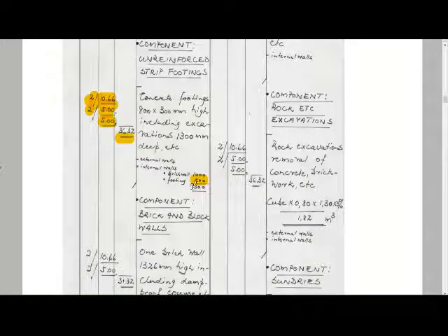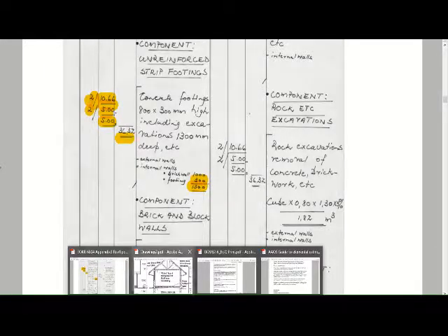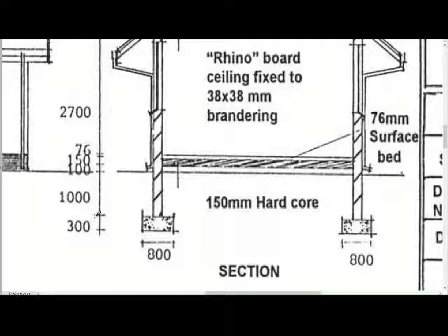This is just so that whenever you do your measurement and need to transfer it to your cube measurement, you can see what the depth is, and when you take it over to your bill of quantities, you times it with this 1.3. So let me just go to our drawing. I'm talking about the 1 meter excavations below natural ground, and then just the 300 millimeters for your strip footing as well.